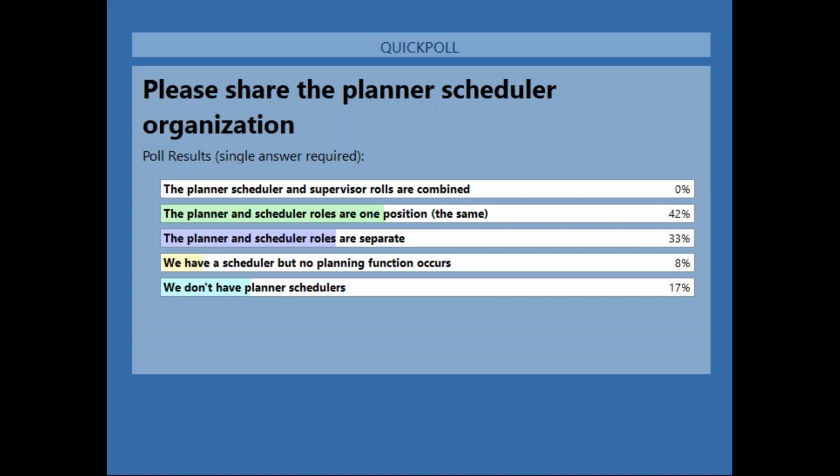You should be creating a backlog of planned work. You shouldn't sit out here and have a bunch of work that's sitting in the queue waiting to be planned. You should always plan everything through, and then you may wait on materials, and then the scheduling function pulls it down. So they're really 2 different hats. And again, do everything from a planning standpoint, and as materials come in, then put it on the schedule, role of the scheduler.